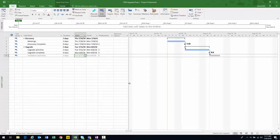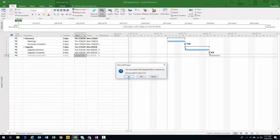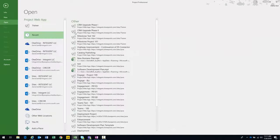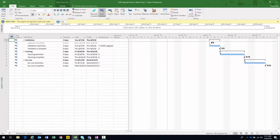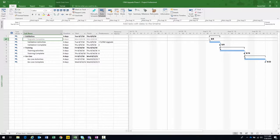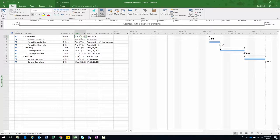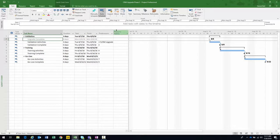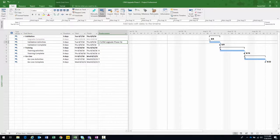As I execute this project and people do work, I update actual work and other data points, and date fluctuations will impact Phase Two. Let me check Phase One in and open Phase Two. There we can see the predecessor — Upgrade Complete — grayed out to indicate it's an external predecessor. The date reflects reality: August 7. The whole project timeline is reflecting reality as intended. The milestone from the predecessor and all dates are visible — predecessor is Upgrade Phase One, row 6. I'll publish Phase Two as well.